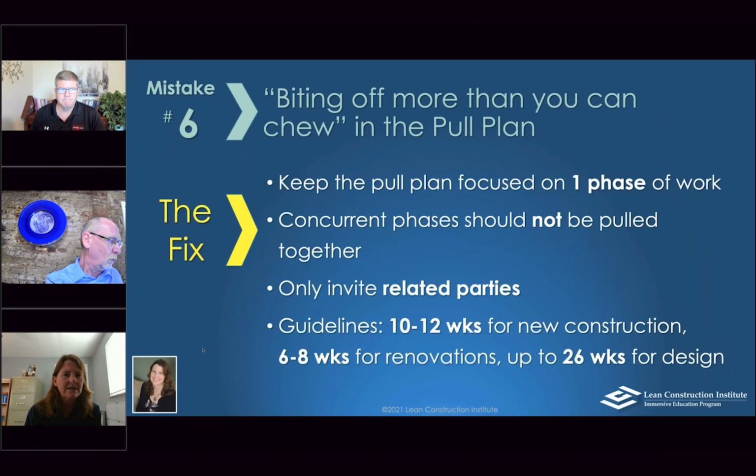Move on to number 6, which is similar to what we were just talking about, and that's the idea of biting off more than you can chew in a pool plan. So we've talked about we've got to have the good milestones, we've got to have them at the right spacing, but now we're going to be in the pool plan, and we're tempted because we want to be efficient. We want to get the topics covered that all the people in the room can discuss. We want to get as much planned as we possibly can at once. And so we kind of look off and our eyes are bigger than our stomachs, so to speak, if you think about it. And we don't get it all finished.